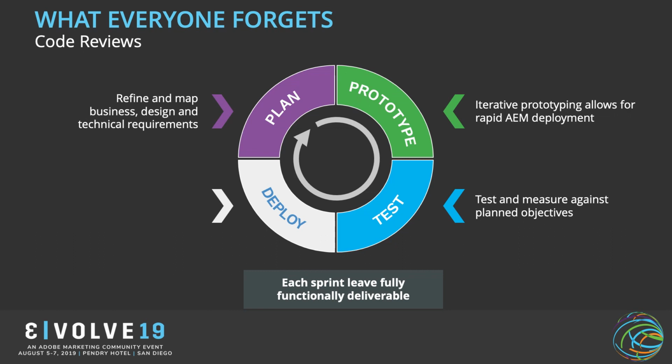Code reviews. I always need to allow time for my technical architects to do code reviews because we like to follow certain best practices about our code. This doesn't take a ton of time, but it means that every single task a developer is doing needs to be routed to someone, and they need time to look at it and either say, nope, fix this, or yes, it's great, and I'm going to pull it into the branch. So have we allowed time for that process, whatever it is that you're aligning?